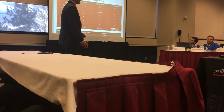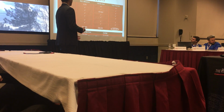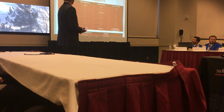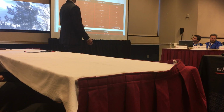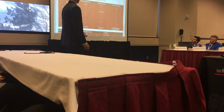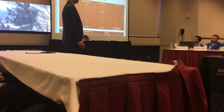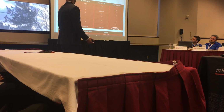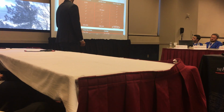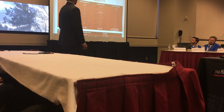For metal supports, we decided to go with Trust the Strut. The reason for this is they had everything we required, and they had a good bond rate versus Mohs Metals, which was the lowest. Mohs Metals also did not include the 3D modeling that we required. So we took that into consideration, and we ended up still being under our budget price and saving about $116,000.